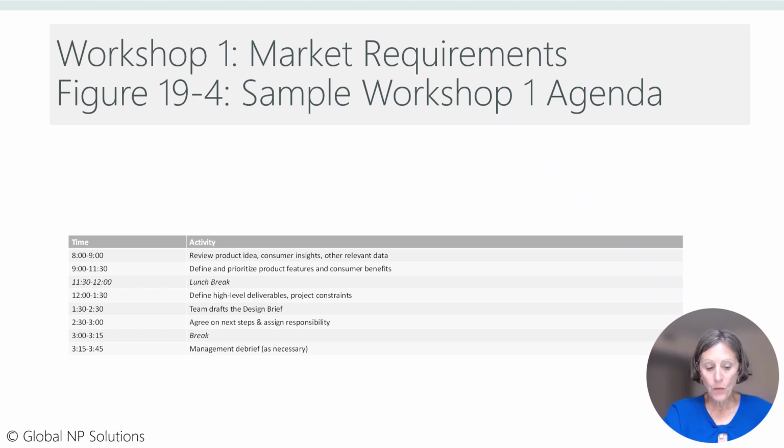Prior to Workshop 1, unique to the first Lean New Product Development workshop, a management review is conducted for the project just before the workshop, a time period of days, not weeks. The management review session includes senior executives working with the chief engineer and product champion to define the next highest priority project. Product portfolio management scores and resource allocation for new product development projects determine the next up innovation project. The chief engineer collaborates with management to determine the scope of work for the new product and defines the project constraints as shown previously in figure 13-3.